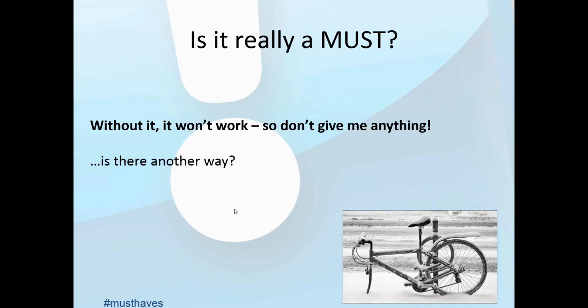Another thing you might want to try and find out in terms of deciding whether it's a must is this idea of, well, is there another way? One project I worked on had a requirement that all the customers were saying it has to be a must, and they were going a bit over the top about it. So I quite simply said to them, well, how are you actually doing it at the moment? And they said, well, we're using Excel spreadsheets. And I said, well, could you do that after the project by any chance if we don't get it in? And they said, well, yeah, we could. Not particularly pleased about it, but they could. Bottom line is, it's not a must.